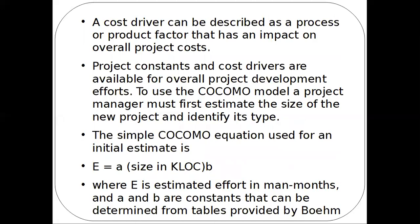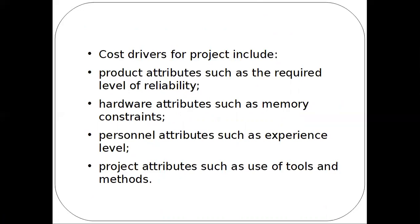We can use the COCOMO model, which is a very famous model for cost estimation. The project manager decides the estimated size of the project and identifies the type of organization. The equation to calculate the estimated effort is: E = A * (size of project in KSLOC) ^ B, where size is in thousands of source lines of code, and A and B are constants. COCOMO cost drivers also include product attributes monitoring reliability and attributes monitoring the number of questions, personal attributes covering experience level, and project attributes covering use of tools and methods.